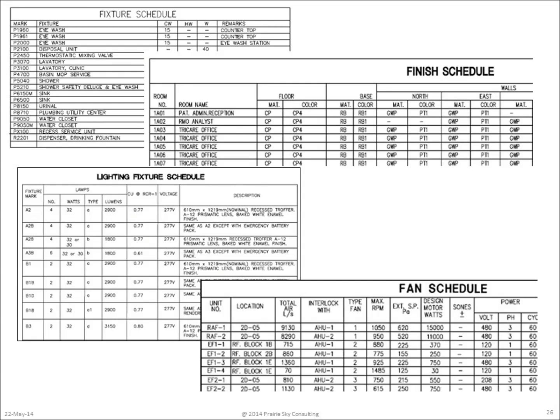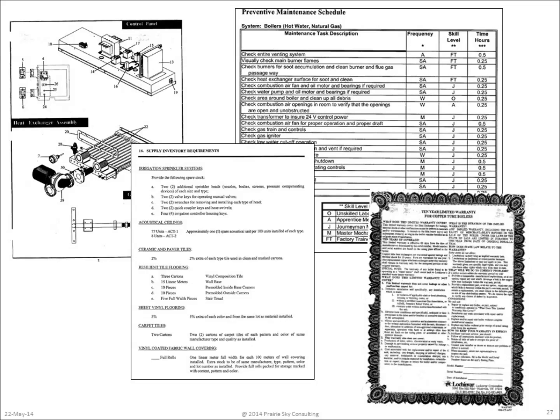Here's an example specification that you can find on the Whole Building Design Guide. It covers design, build, and construction contracts. The design requirements for COBE are quite straightforward — any time a contractor goes File, Print to make a set of drawings, they also need to go File, Save As and provide the COBE data, which is the list of all of the scheduled assets in the building. The design data should really be thought of as an outline of all of the assets in the building. It's up then to the contractor to fill in the outline with things like preventive maintenance schedules, supply and inventory requirements, replacement parts, make, model, and serial number, warranty information, and other such information. All that information is already required in their contract — they're just linking it in based on COBE submittals.